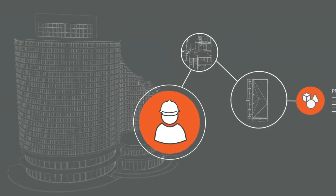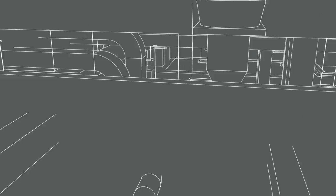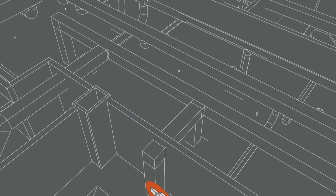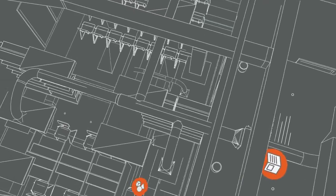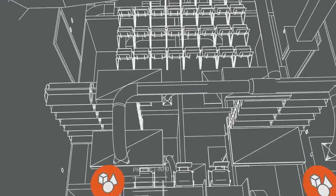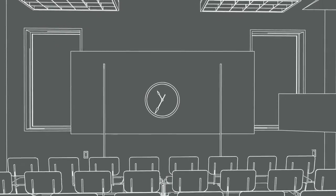site. Finally, dRofus plays a vital role throughout the FM handover and asset management stages of a project by enabling true lifecycle planning and management. dRofus facilitates this by allowing FM handover through open international standards such as IFC and COBie. It also documents all systems and components and provides a complete digitally documented replica of your building to facilities management. dRofus maintains a complete asset database that's synchronized with your CAFM system.